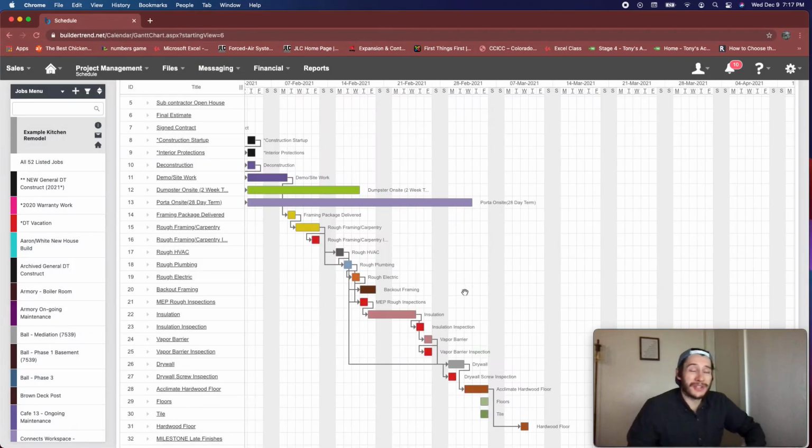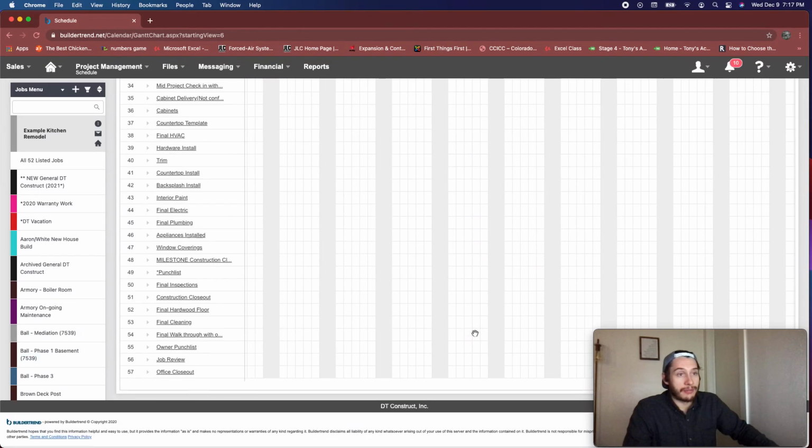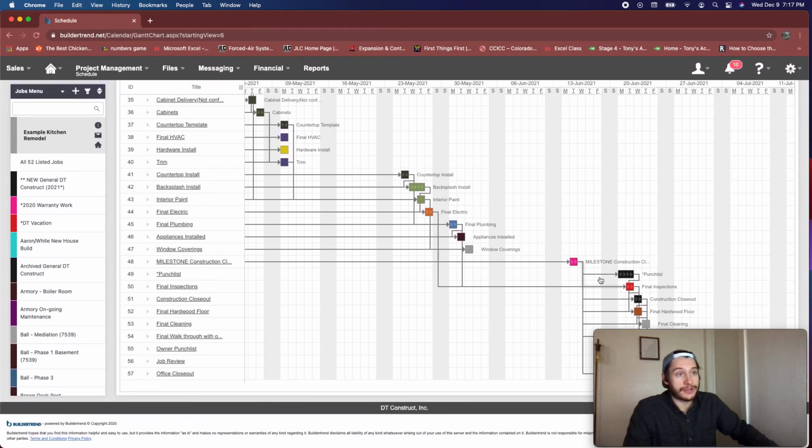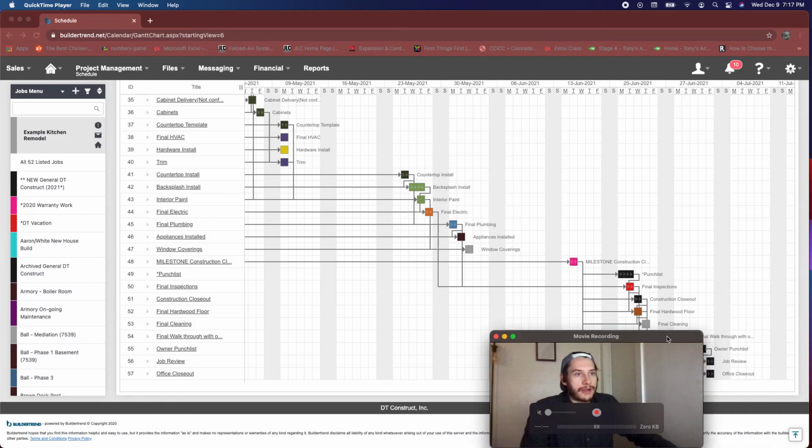Great. So sometimes you actually don't have enough links in your schedule items. You might want to add another predecessor link besides just having one. Having just one can make it pretty easy to flip-flop and turn your schedules into spaghetti. But if you've got 2, it actually can be helpful, or even 3. Sometimes they'll keep you on track a little bit better. Another great example of this is final inspections. When do you call your final inspections?